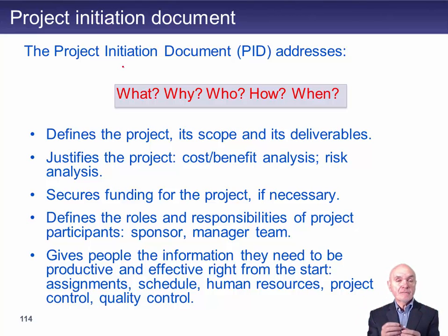What is the project? What's it going to do? What's it going to accomplish? What are the deliverables? Precisely what's it going to do? Why are we doing it? What's the financial justification for doing it? Who's going to do it? Who's the project manager? Who's the project team? Are we going to get outside project managers coming in to be change agents and so on to help us with that project? How are we going to do it? All internally, shared, all subcontracted? When's it going to be done by?